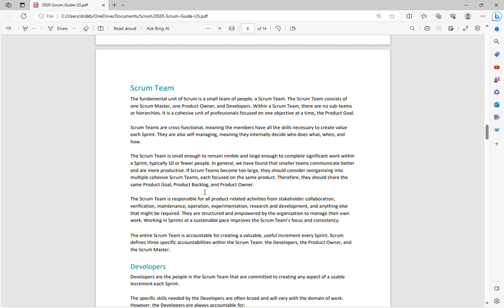If you think that your project requires more members, if to complete the project a smaller Scrum team of 10 people will not be sufficient and more developers are required, in such case it is recommended that you create multiple Scrum teams, like having two different Scrum teams who can then have Scrum of Scrums to integrate the final product.